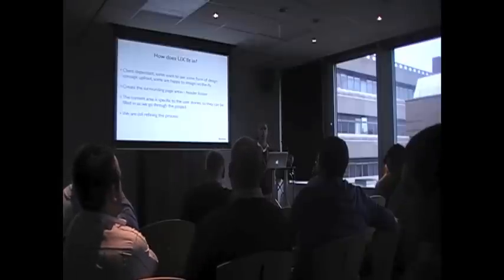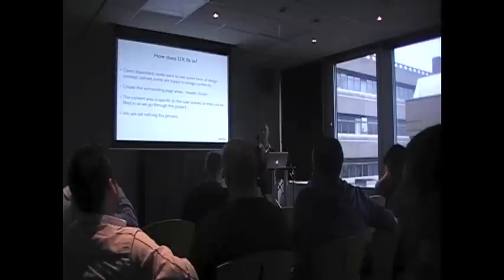It's actually made our estimation a lot better and made us a lot more efficient, because we're leaving time for the support requests that come in that you've not thought about, and other emergency things through the week that take developers' minds off the bit they're supposed to be on. So it frees up space a bit and you don't take on too much, because your focus factor is less.